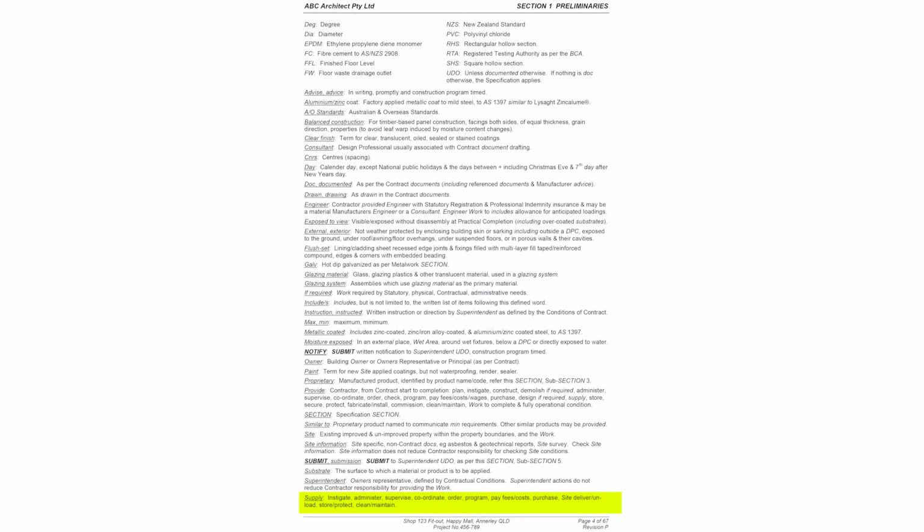Equal to is never used as it can't be quantified and does not allow better quality. Similar to is a contractor material selection, specified clearly in clause 4.2. Lastly, supply is defined, as it is often misinterpreted, especially in terms of ordering, purchasing and post-delivery. In this spec, there is no doubt.